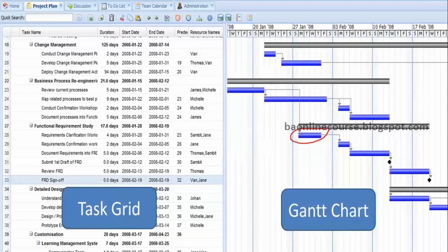So this particular task here can start only after this is completed. Right? Rather it should be the other way. So this will be completed, and then you can start this. Right? Similarly, this can start only after this is completed. So all those dependencies are also coming out in this Gantt chart view. So you can easily figure out, rather than go through this list, it gives you a much easier way of understanding how the activities are performed.